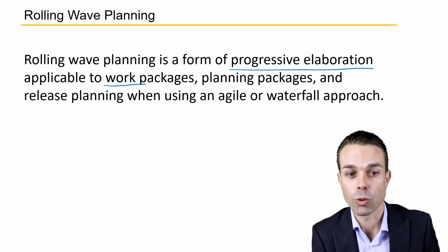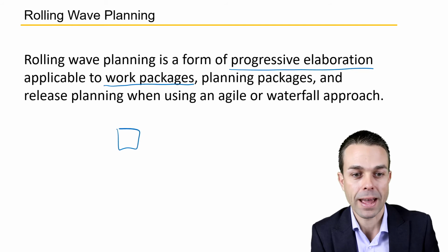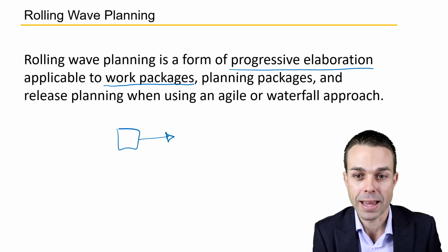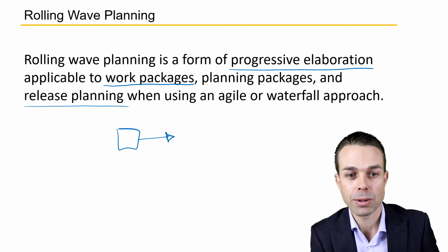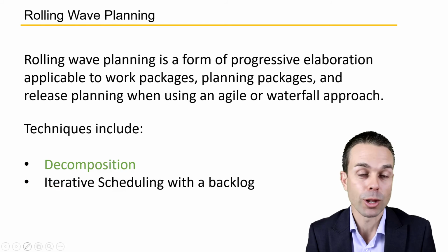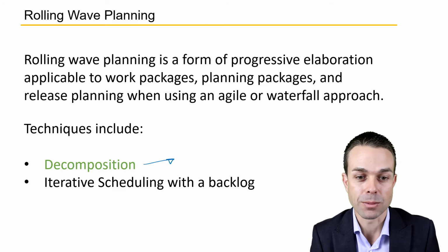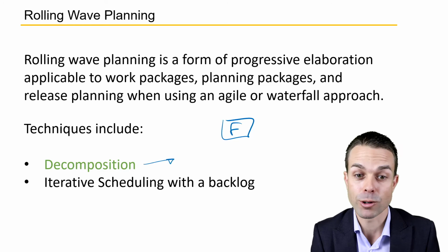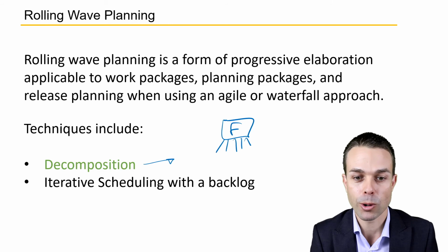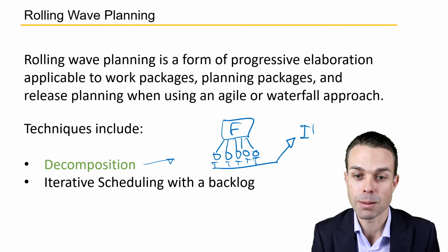It's applicable to work packages, so the packages that we're assigning to our teams to deliver as part of our project, planning packages, and also release planning when using an Agile or waterfall approach. The techniques that you'll see for rolling wave planning include decomposition, because we're starting with a high level, for example, a feature, if we're using feature-driven development, and we're decomposing that into work packages that our teams can work on and then deliver for that iteration, for example.